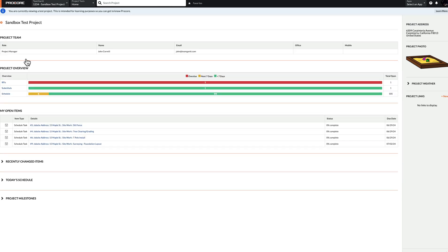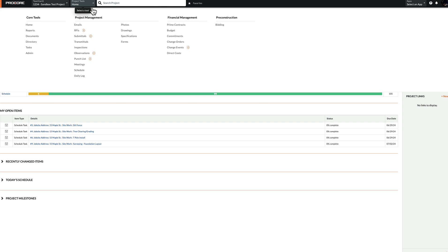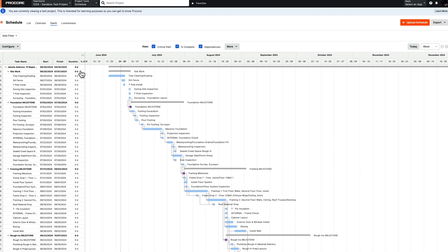Once you've done this, open your existing project in Procore. From here, click the Project Tools dropdown menu, select Schedule, and then click the orange Upload Schedule button.